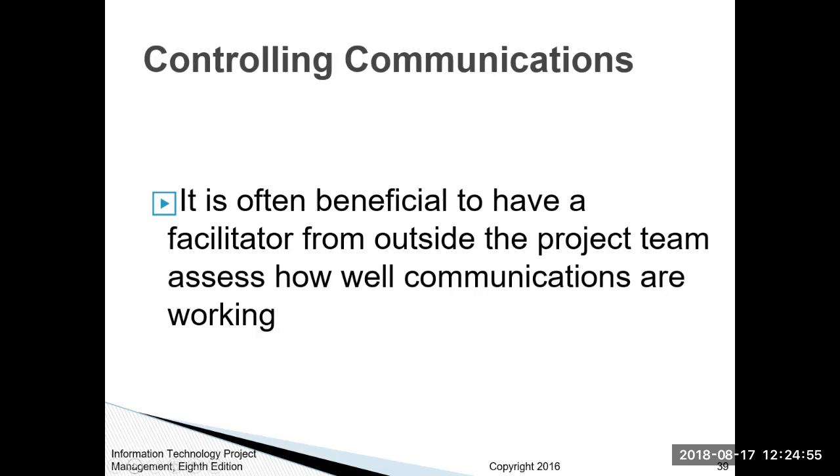And those sound walls were purposely put in because of these outside patron committees, and sometimes you don't always have to have the outside factor, because if you've already done that particular type of interaction with the patrons and they come in and give that, you can take that information and move forward in future projects. And so now you know that all future projects, you're going to have to do a noise study, you're going to have to do an environmental study, you're going to most likely have to build a concrete wall to help block the sound and the fumes from the neighborhood, so you protect the well-being of the people in that community. So there's a lot of different factors that come in controlling these communications.